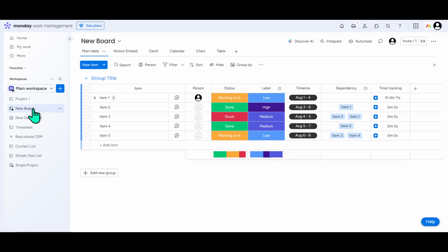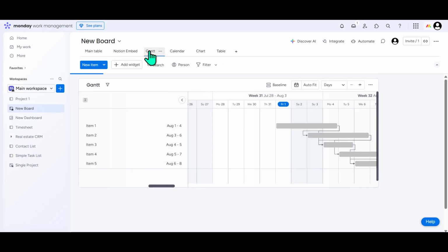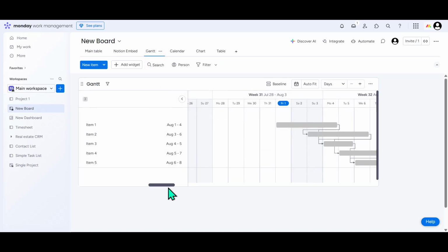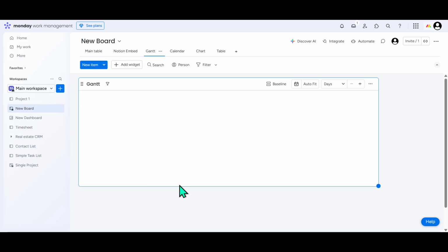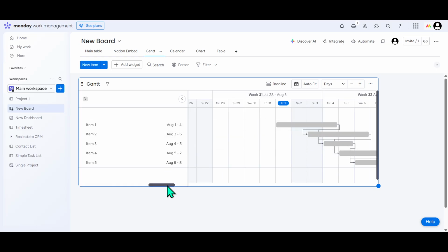In the realm of managing projects, the critical path refers to the sequence of dependent tasks that determine the shortest possible duration to complete a project. By identifying the critical path, project managers can pinpoint which tasks directly impact the deadline, giving them a clearer picture of where delays could potentially extend the project timeline. It's an invaluable tool for keeping projects on track and ensuring timely delivery.